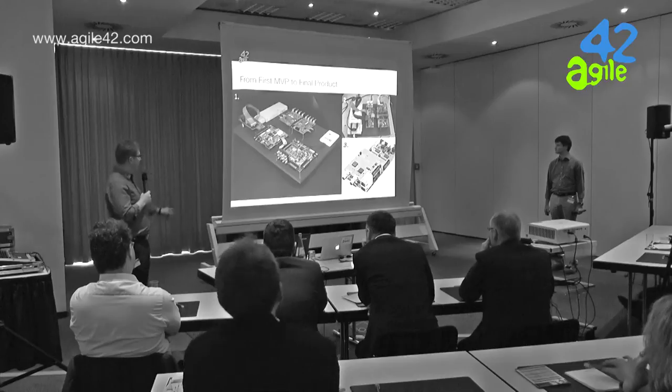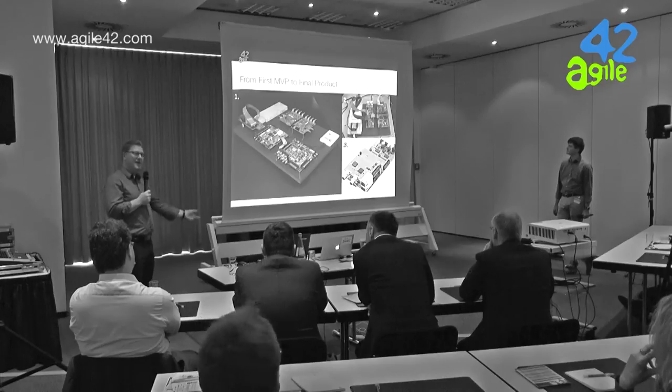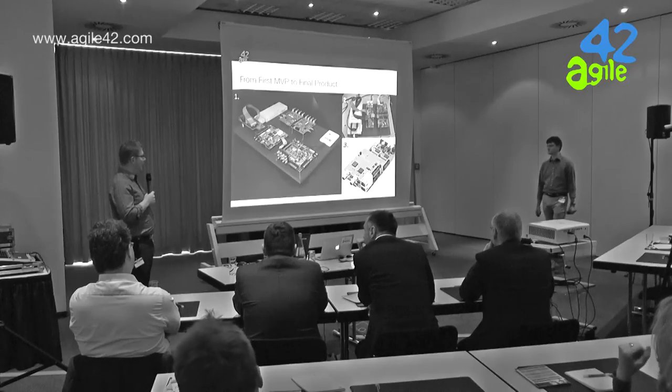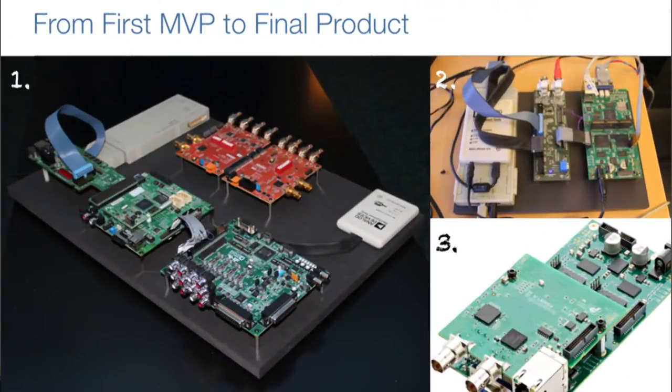A little later, when all the decisions were made, of course the hardware developers were drawing that in the schematics. And when they got their first real prototype, that is picture number 2 of the main board, a 9-layer high-speed board with one host processor and 2 DSPs, the day they got that, after half an hour, they were running the host processor. By the end of the day, they were running algorithms on the board. It usually takes months to get to that. So that was pretty fast.